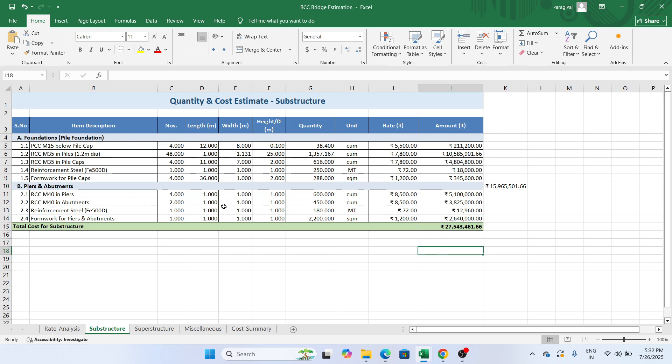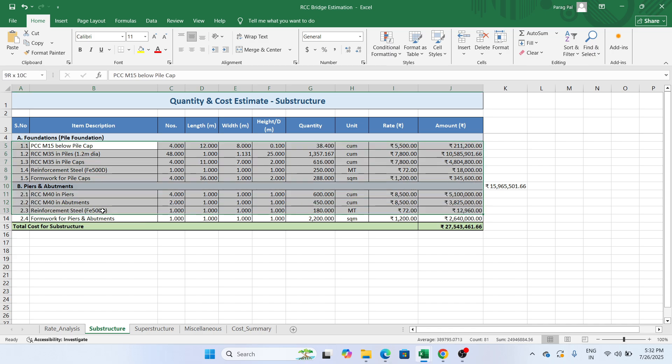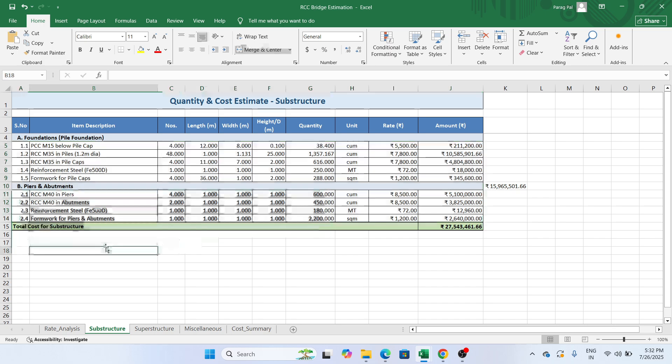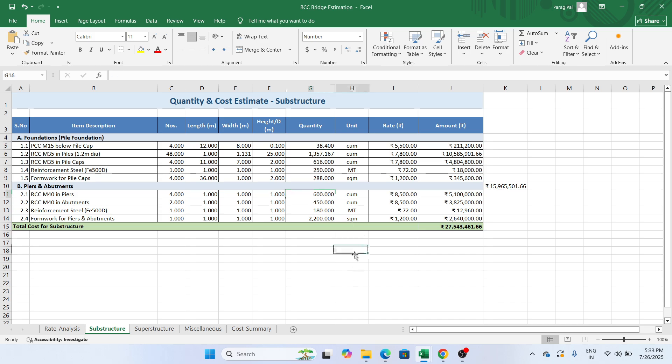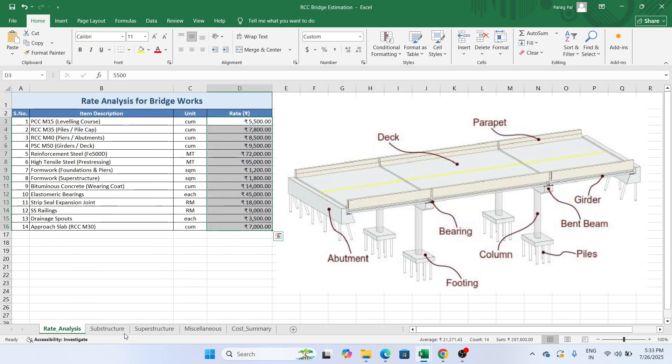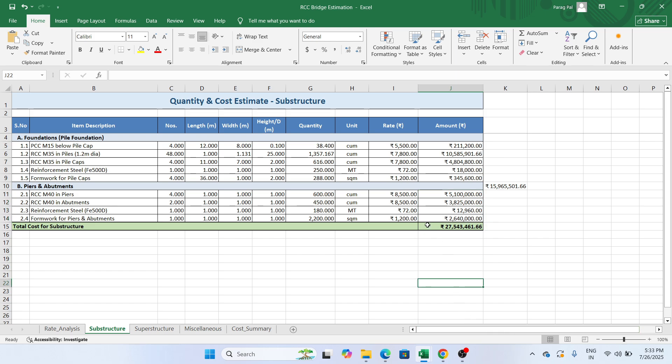Now if I go to the piers and abutment foundation, for piers and abutments we want RCC M20 in piers, RCC for abutments, reinforcement steel and formwork. All this data will come from your drawings. You cannot assume this. You need to add the numbers, length, width and the height and the quantity will come as a multiplication of that. You will get the rate over here because the rate is parallel to this which we have considered here in the first page. Based on that you will get the cost. Total cost coming 1.15 crore. So if I just consider both costs you have 2.7 crore required for this construction of the substructure work for a bridge.